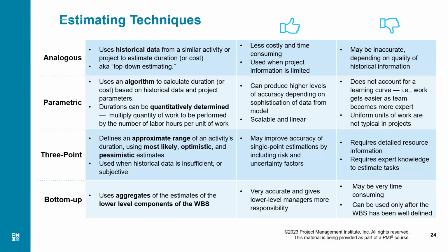Okay, last time we finished in 200 days. Now the scope is a bit different, looks more than what we did in the past. So I'll say 250 days, but that's a rough estimate. This is analogous estimation. I told you about the duration of a project. You can use it to estimate the duration of an activity. You can use it the same way. Okay, how much will it cost? I want a ballpark figure. Same thing.